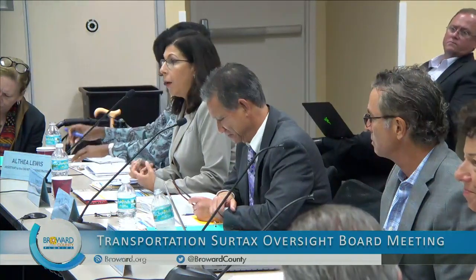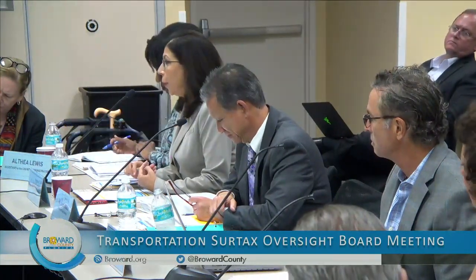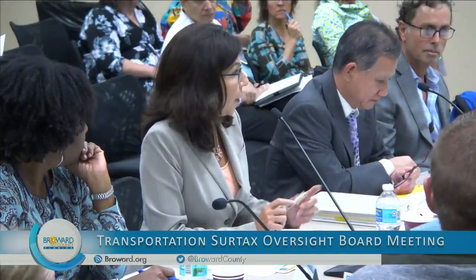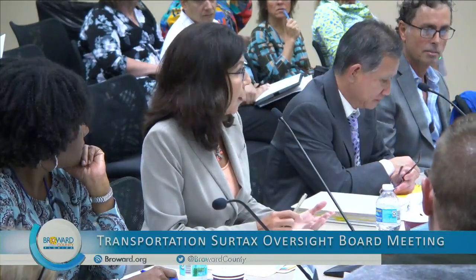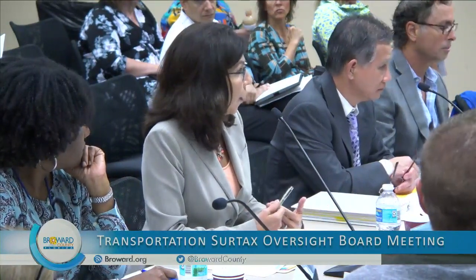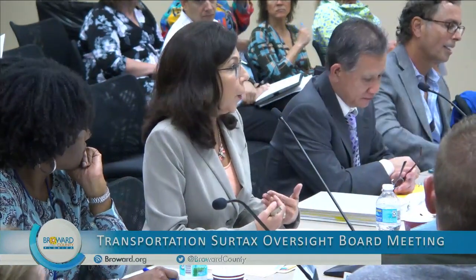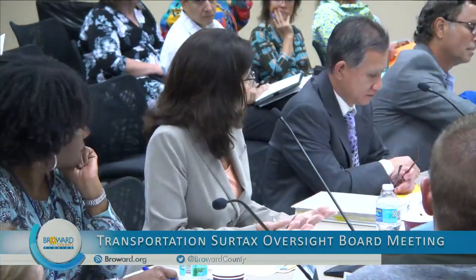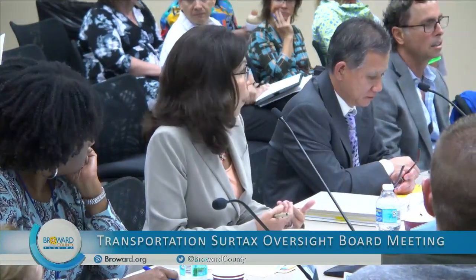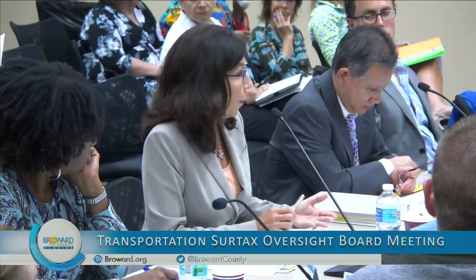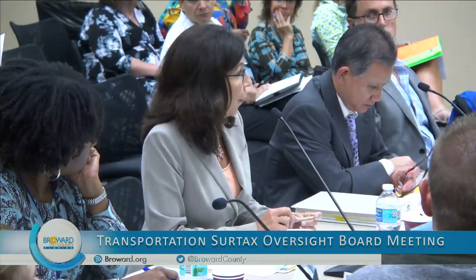In order for us to meet the goal on eligible projects, and I think we've talked about this a little bit in previous meetings, but federal funds, as Ms. Pennant just mentioned, will prohibit us, once we accept federal dollars, from having goals on these projects. So every time we have to balance the desire to leverage federal dollars with the desire to meet that 30% goal for small business and local preference.